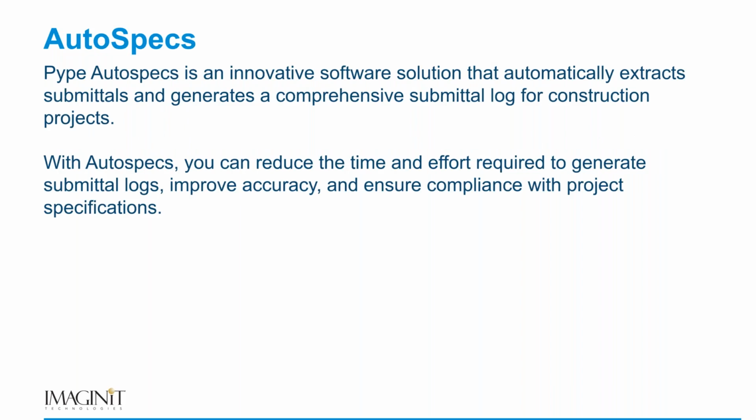But in general, AutoSpecs is that really smart OCR tool that allows us to break down our spec into a submittal log that we can manage through a nice interface, edit it, create revisions, update it, and then push that into Build.